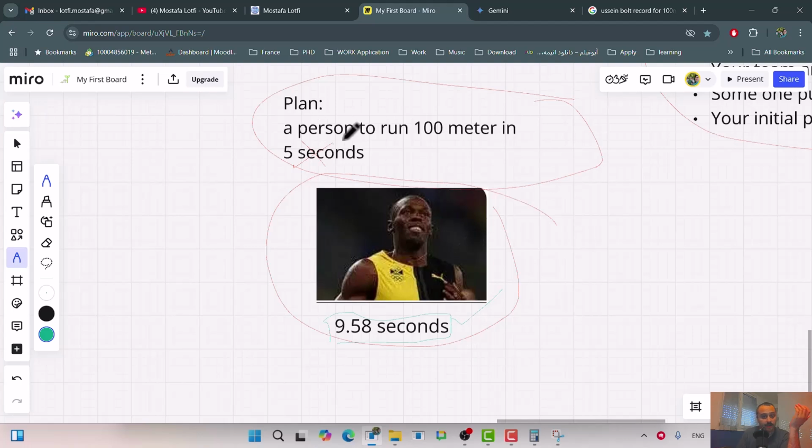But because your original estimate was wrong, now SPI or CPI is showing a very bad result. And it's not the problem of the resource, it's not the problem of someone stealing or someone not working efficiently.